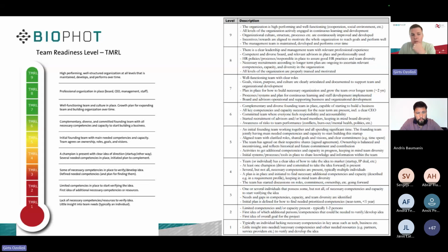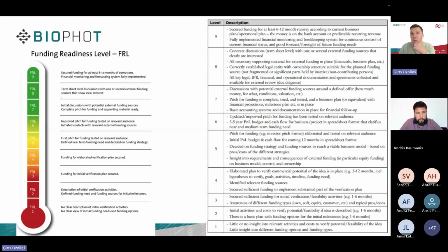And funding, funding is important also. It usually takes quite some time to secure funding, whether it's public funding, right? When we write projects, it takes a lot of time until you submit and then actually get the funding. And the same with private investors. Usually it takes maybe half a year, or more than a year. So basically, in terms of BioPhoT, your project is over after 12 months, and so you actually need to start thinking of other funding sources.